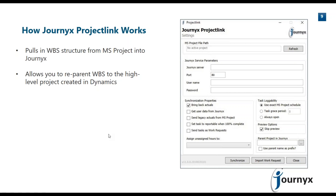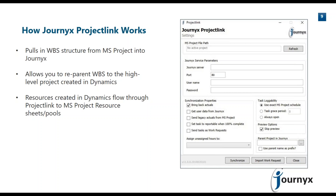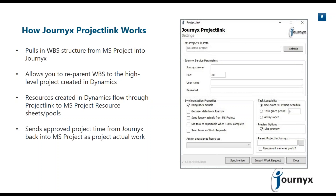That reparenting capability is a key factor in the solution. Project Link also allows you to pull all resources from ERP into Journix and then feed that same resource list into your resource sheets and resource pools within Microsoft Project and Project Server. Finally, once time has been collected in Journix, we can send that approved time back into Microsoft Project as actual work, alleviating project managers from having to manually enter data back into their project schedules to update actuals against estimates.